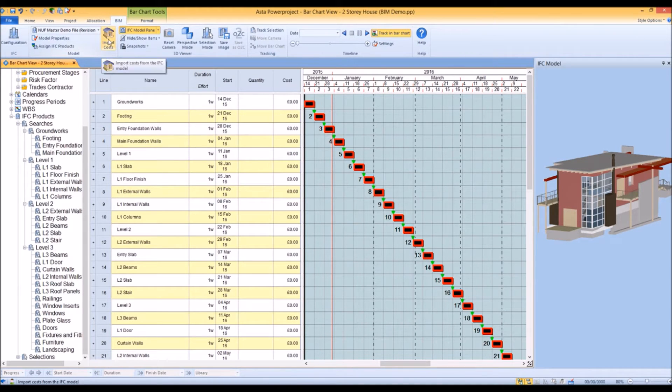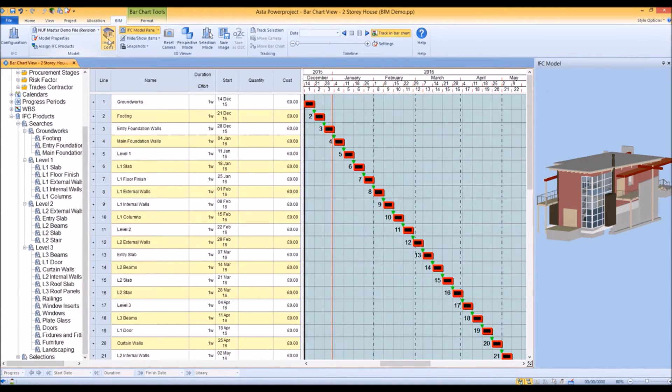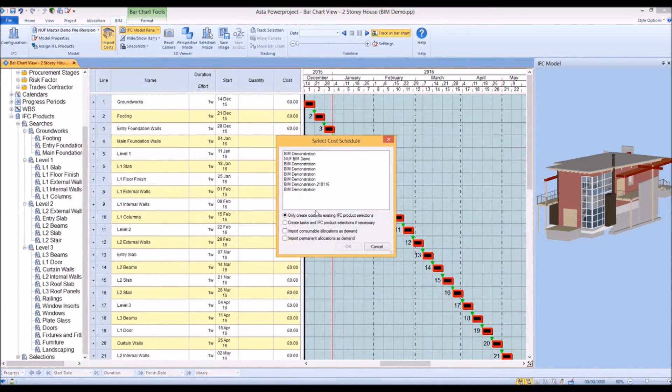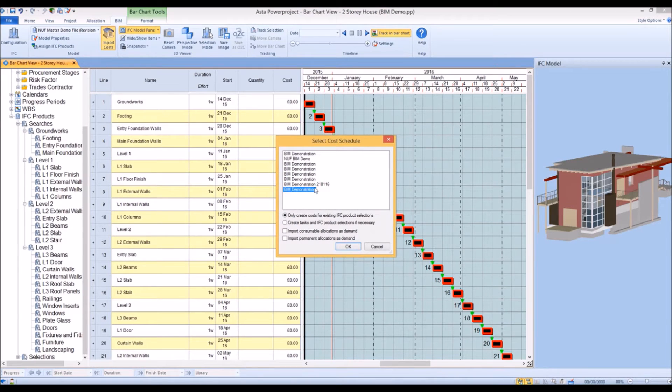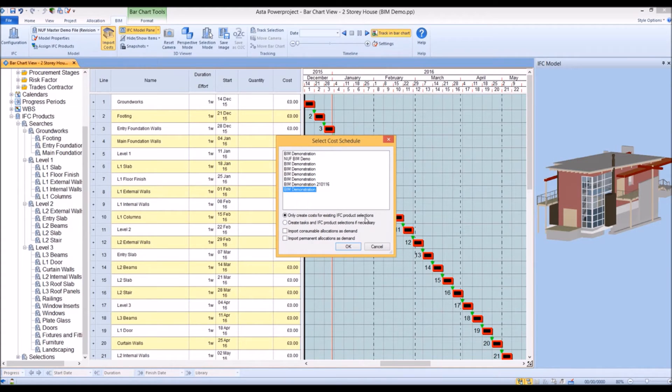Via the BIM tab, let's import costs. We'll choose the cost schedule that we want to import. In this case, I'm only going to create costs for objects that have been linked to tasks.